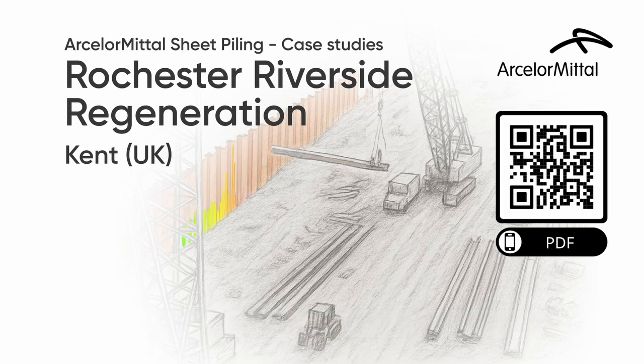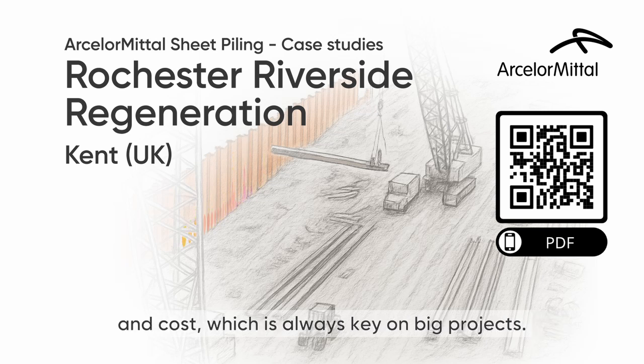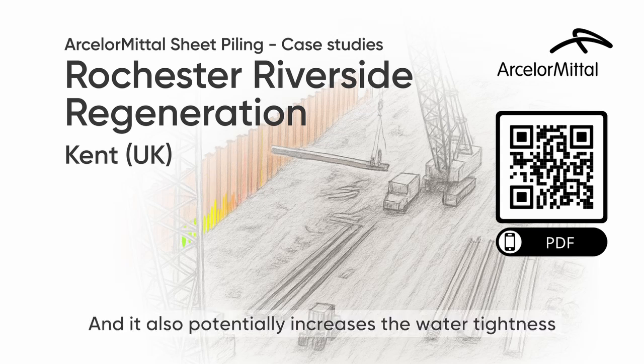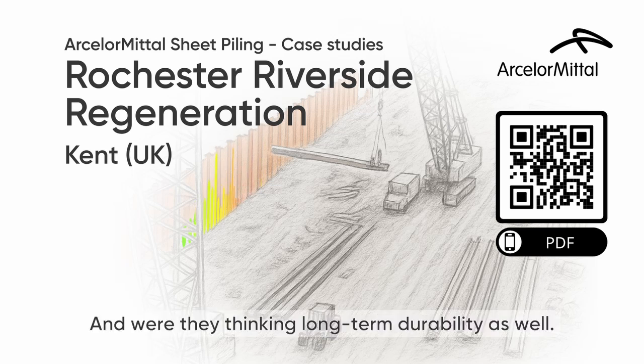Okay, why those? Well, a few reasons. They offered a really good balance between strength and cost, which is always key on big projects. Sure. But also, wider piles mean fewer piles to install overall and fewer joints between them. So that speeds up installation. Ah, makes sense. Quicker work. And it also potentially increases the water tightness of the finished wall. Fewer gaps. Okay. And were they thinking long-term durability as well?